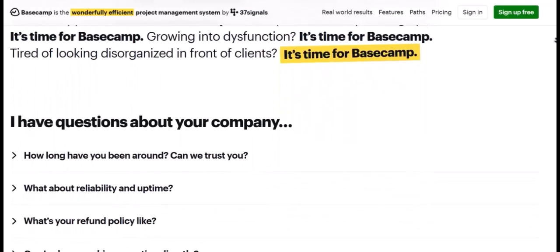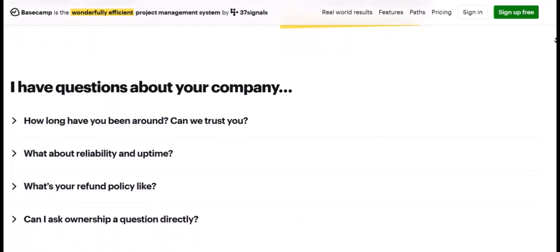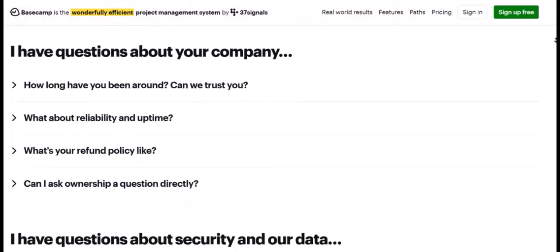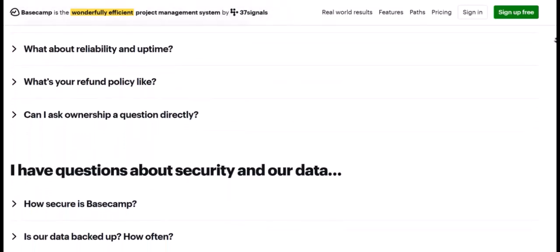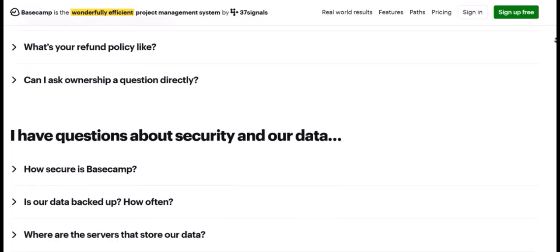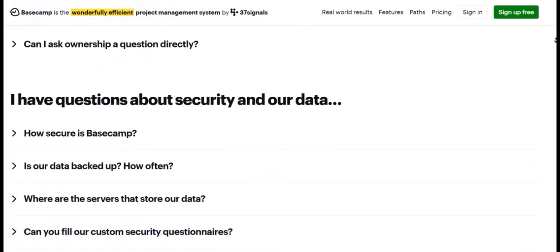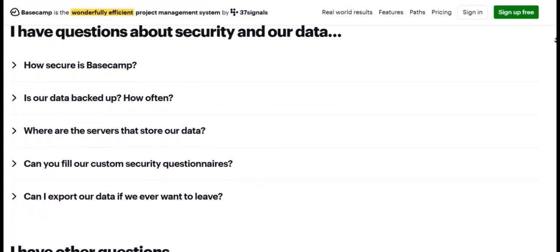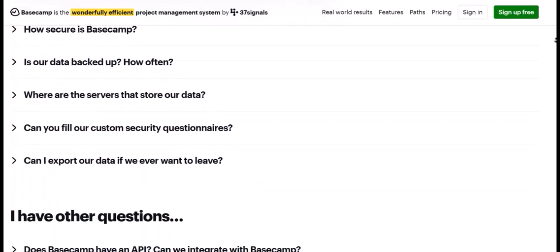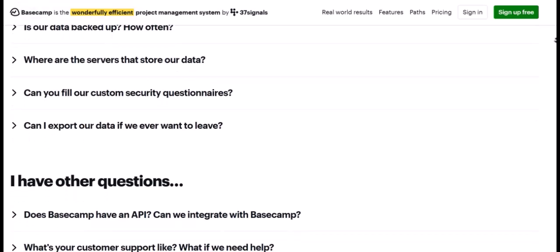Add a due date, optional but recommended. While assigning sets accountability for who, a due date sets accountability for when. Next to the assignee, you'll typically see an option to set a due date or a calendar icon. Click this to select a specific date for the to-do's completion. This is crucial for managing timelines and ensuring tasks align with project schedules.